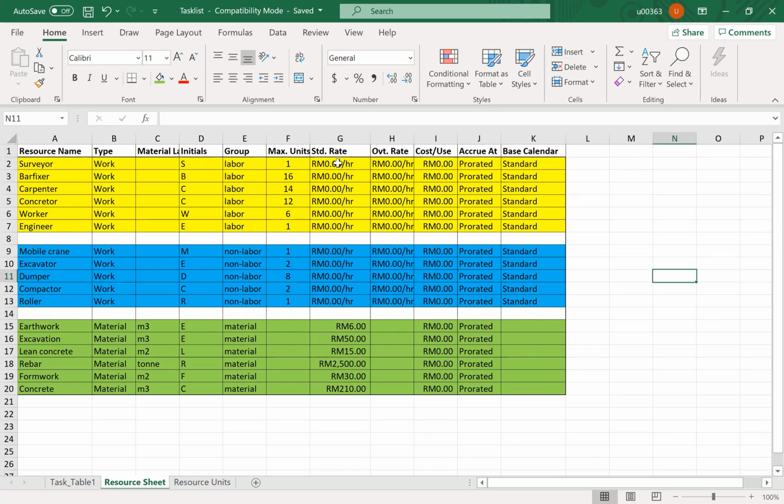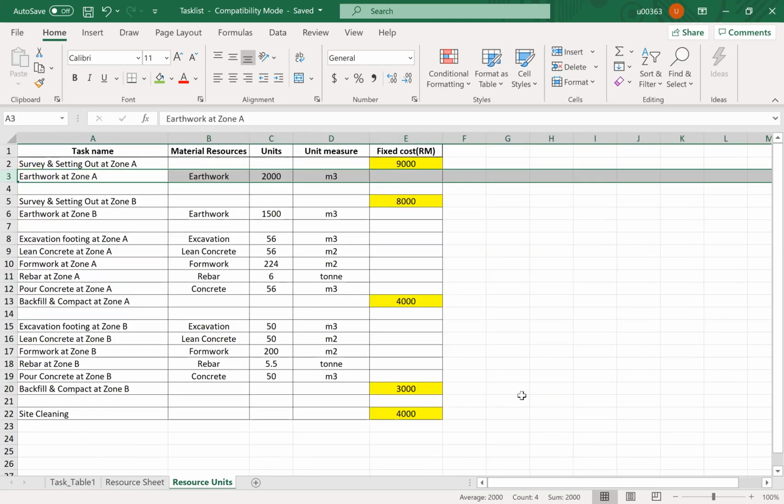We can simply leave the cost at 0 for the manpower and also for the machinery, and just put the cost for the unit rate, which we assume is inclusive of man, machine, material, and profit. For the items that have a unit rate, it is okay.